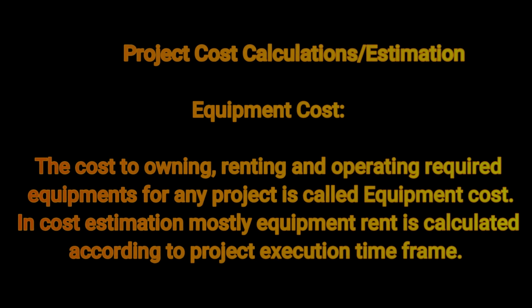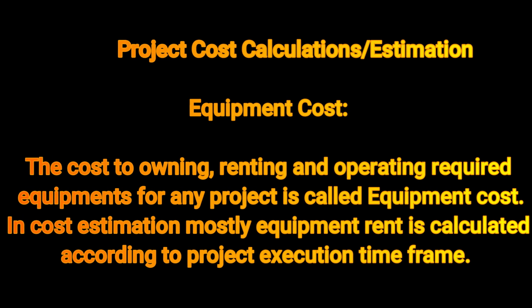Equipment cost. The cost of owning, renting and operating required equipment for any project is called equipment cost. In cost estimation, equipment rent is mostly calculated according to the project execution time frame.